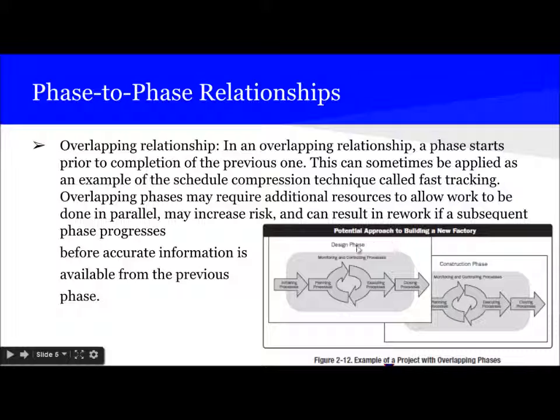So this is an example, a potential approach to building a new factory. Design phase and construction phase. While design is not complete, the construction can start. But this might require some rework because construction can assume something and the design might change. So this is a kind of risky relationship.